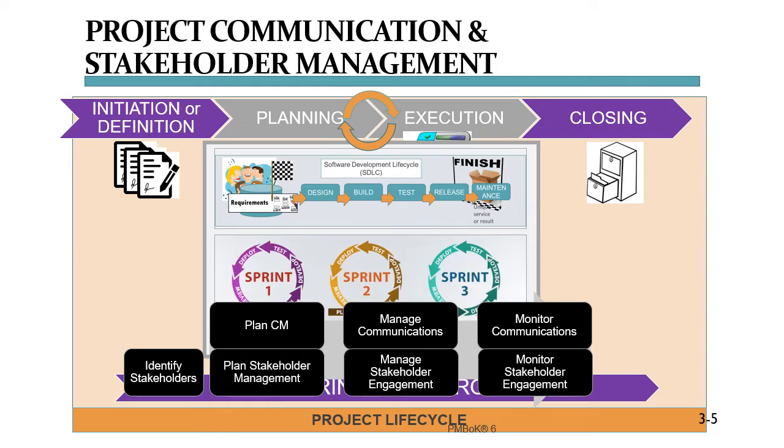So once you've set up your communication rhythms and you have your email lists or Slack or WhatsApp groups and your SharePoint dashboards in place, it's important to ensure that you send out the data you promised, when you promised them, and to whom you promised them, making sure that every stakeholder who needs to receive communication from you also gets this communication and has adequate time to comment, approve, or ask questions and knows who their contact people are. This is where monitoring communications and stakeholder engagement truly intersect.